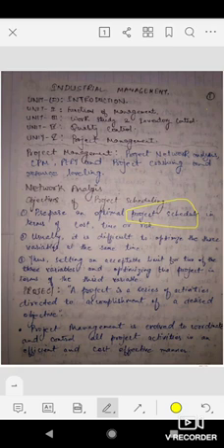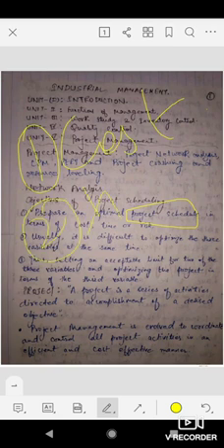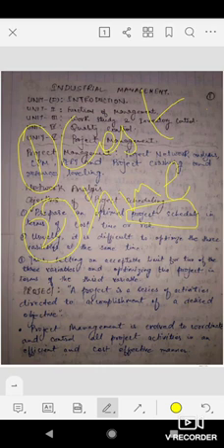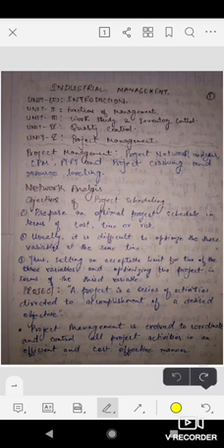Usually it is difficult to optimize 3 variables at the same time: cost, time, and risk. So, as I mentioned in the third point, we set an acceptable limit for 2 of these variables and optimize the project in terms of the third variable. Generally we fix the cost, which is the rough amount of the project, fixed by experience, and we fix the risk.